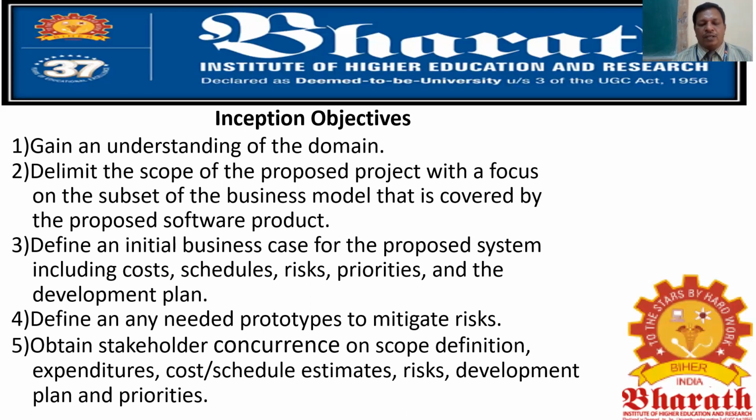So in every iteration, the analysis phase, the evolutionary phase, the construction phase, and finally before product development or releasing, you can have a meeting with the customer, so that your money and time may not be wasted. If he refuses the entire project, then the entire project time, cost, everything will be lost, isn't it? So the stakeholder concurrence is very, very important.